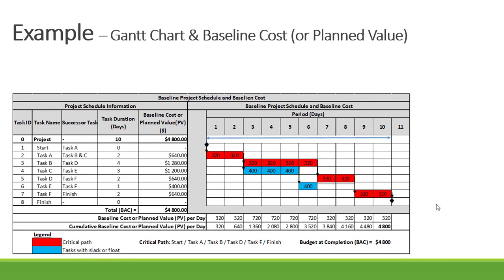Let's prepare our Gantt chart. The start milestone is connected to task A; task A is connected to task B and C; task B is connected to D; task D is connected to F; and F is connected to our finish milestone. That is our Gantt chart with our critical path: A, B, D, and F — shown in red. The tasks in blue are tasks that have float.